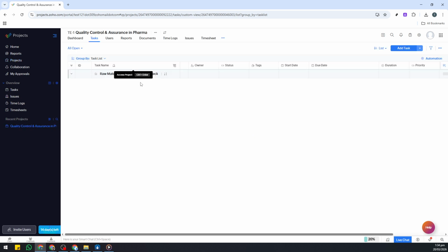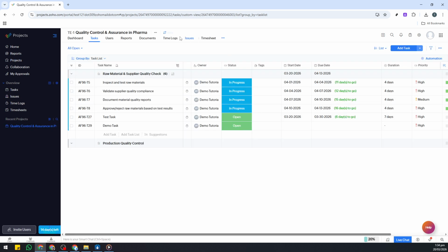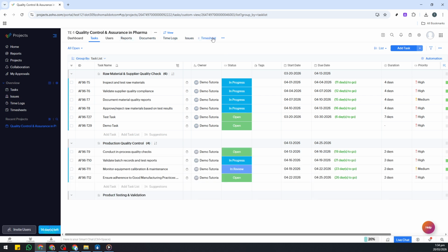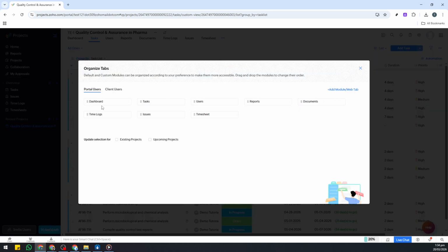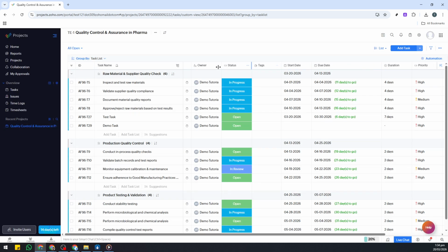Once you're inside, look for the Phases view or the Milestone view. Depending on your account's language or how your organization labels modules, Zoho may refer to milestones as phases in certain areas and milestones in others. The key thing is that you should see a dedicated place where milestones or phases are organized. If you don't see a phases or milestones section in your project navigation or within the tasks area, that's your signal that the module isn't currently enabled and needs to be turned on.